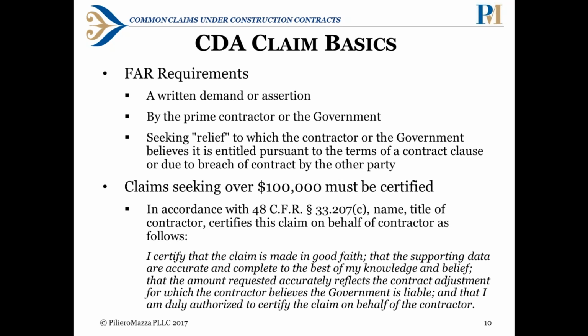And you believe the government is liable, and the person who certifies the claim must be authorized to act on behalf of the contractor. It doesn't necessarily need to be the president or the vice president, but anyone with the authority to bind the company.